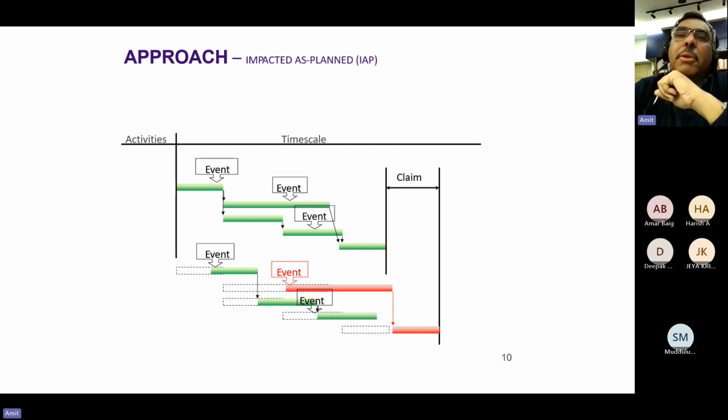So that is why, if I am the right person, I would do a prospective analysis and say that look, the COVID impact, whatever I can foresee, is likely to be 1 month or 2 months. So I will give you a minimum EOT of 1 month, because the impact will last at least one month. And then decide after 1 month whether you need more. In COVID wave 1, probably it was very difficult. But in wave 2, you could have easily said, okay, wave 1 impact lasted for 3 months, so for wave 2, let me give you an EOT of 2 months.